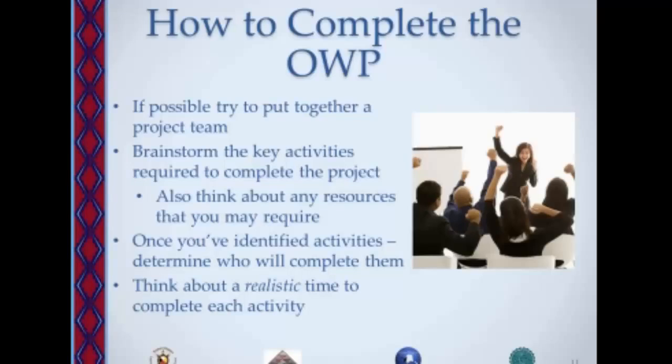Now there's a number of ways to do this. You could just sit and jot down activities on a piece of paper. I've seen a lot of people that have taken Post-it notes and started writing activities on Post-it notes, and putting them on a blank wall. And that lets them rearrange easily and put the activities into chronological order.